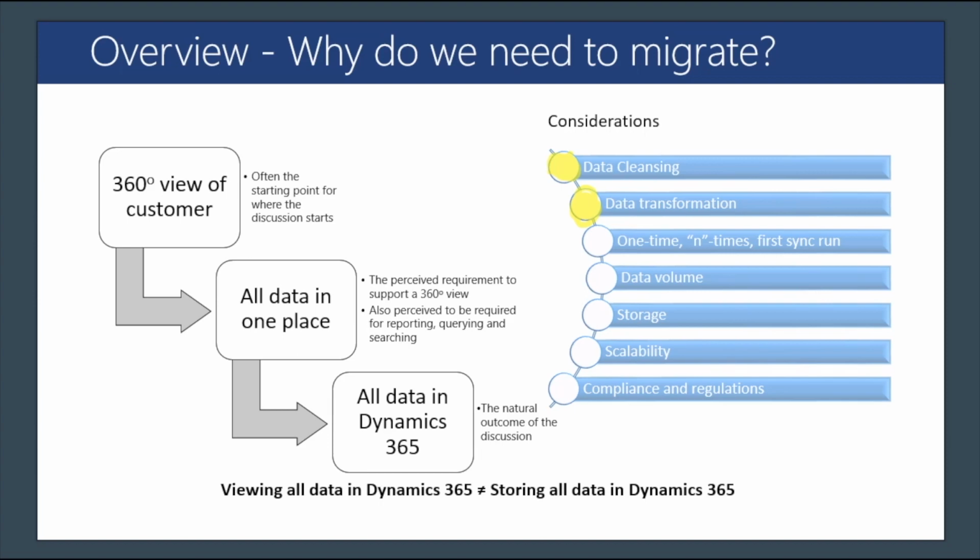The next one would be in terms of real migration time. Let's say that you're considering doing the move over a weekend, so you shut down your old system on Friday evening, and you do all the data migration during that weekend, and you're assuming that on Monday morning everything is on, and you can move all the users to Dynamics 365 Online, and it's all there.